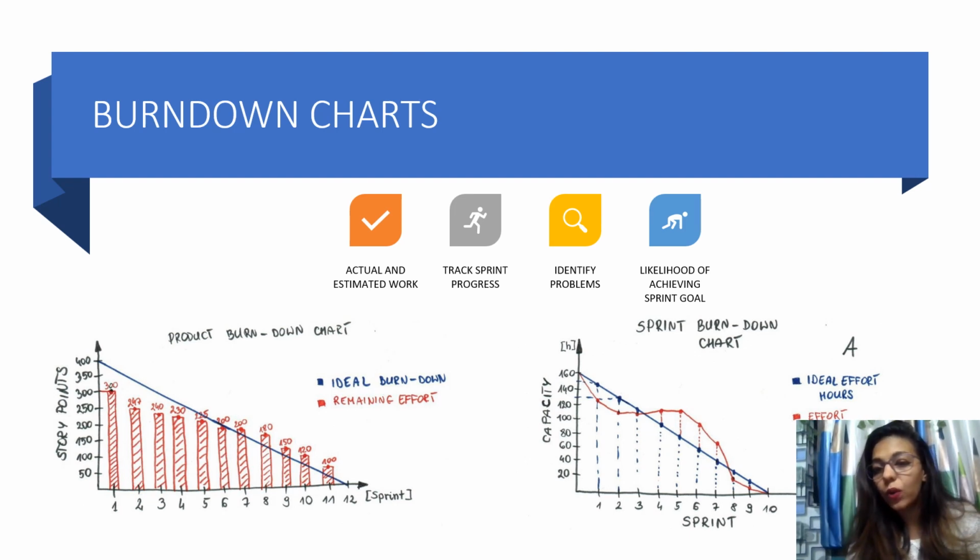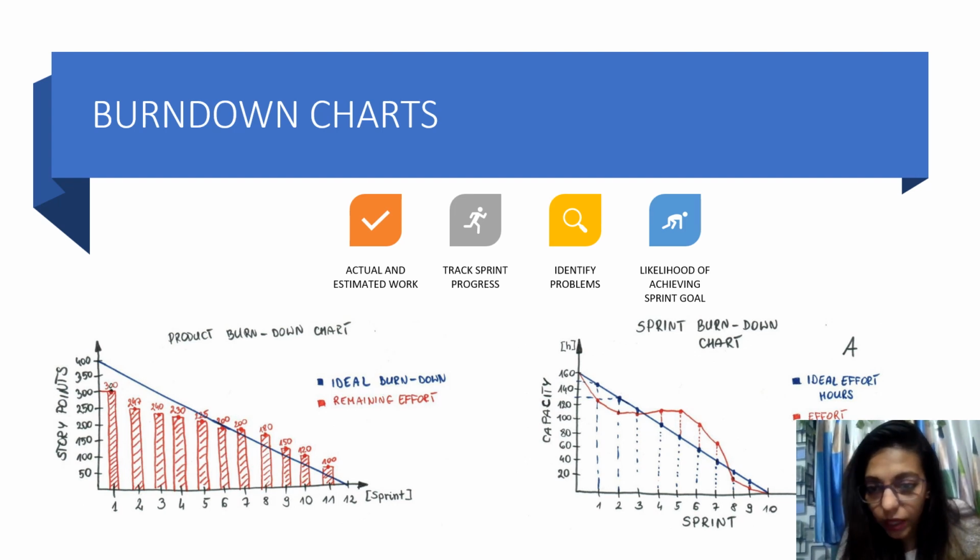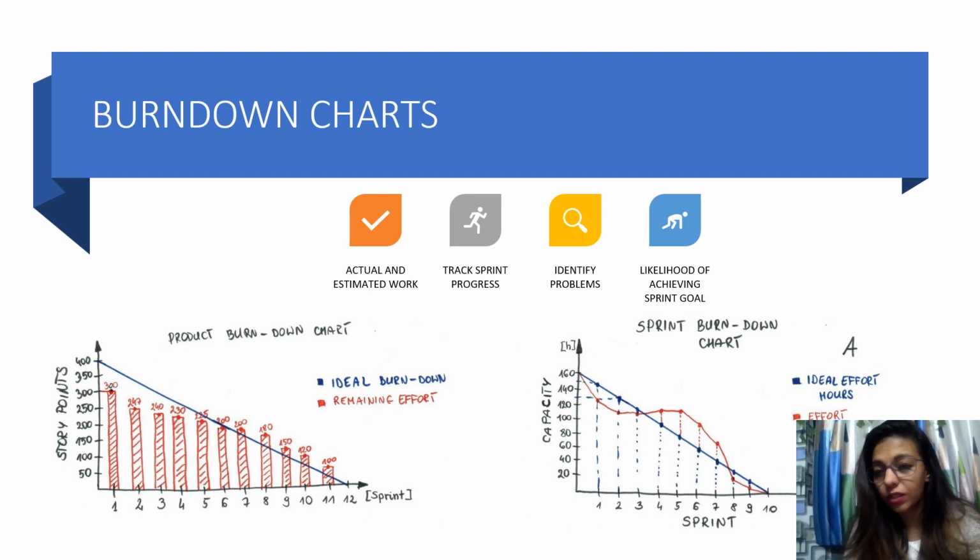But now when we go ahead here, see here what it says, that we should have completed 120 at day 3, but what it is showing, that we haven't completed it yet, we are at day 4. So this means we are exceeding the time, okay. So this is exceeding, we are taking more amount of time, more amount of days to reach this story point,